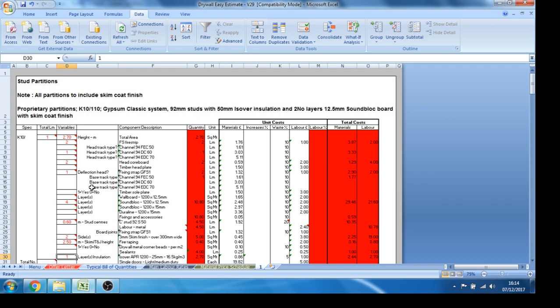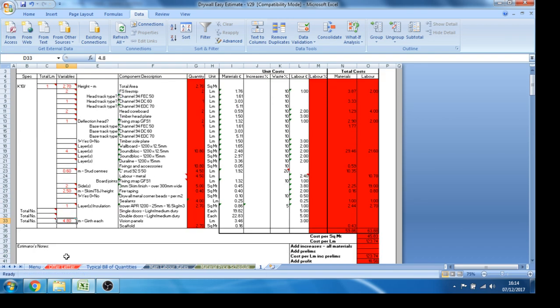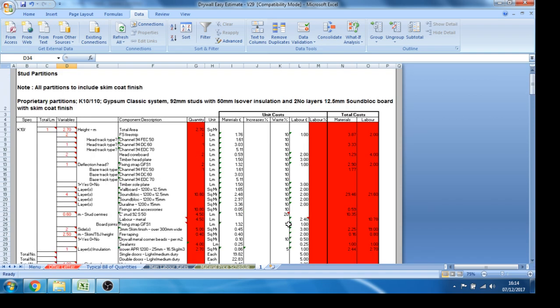The base rate is set up with 25mm insulation at the moment, but as with the wallboards and any other items, these can be switched over, as all the items in the material common description are linked through to the material price schedule, which is over here, and they're all really easy to switch over. Scrolling down, if we need to include door openers within our rate, we can, but I'm assuming this time that again they're measured separately. As all the T's and abutments are measured separately, I'm going to reduce the waste factor on my studs.